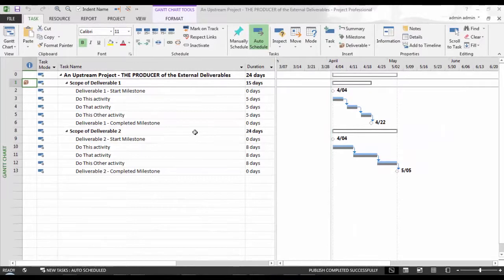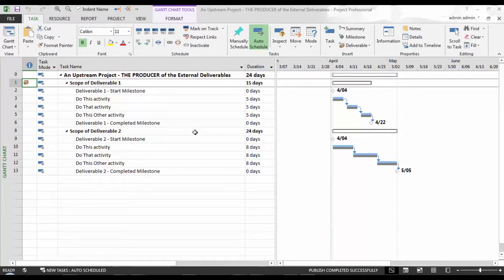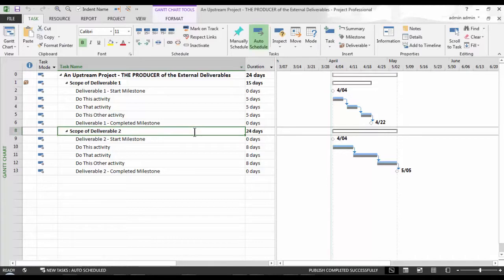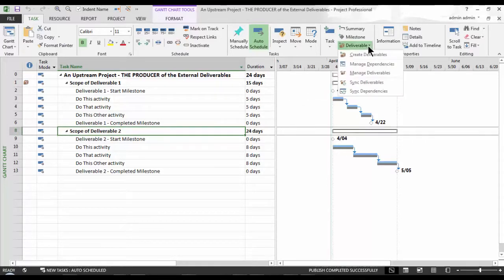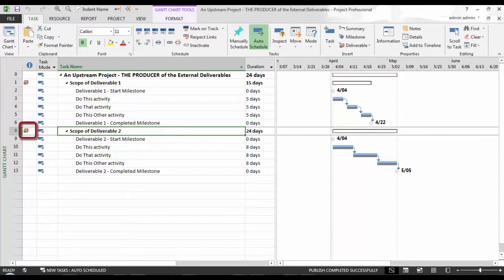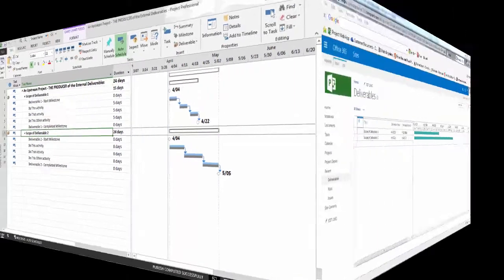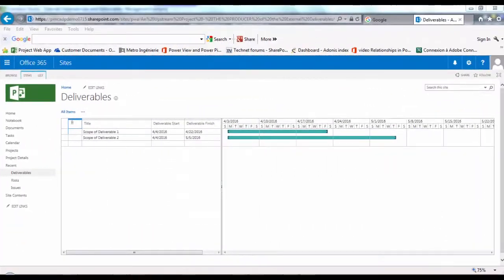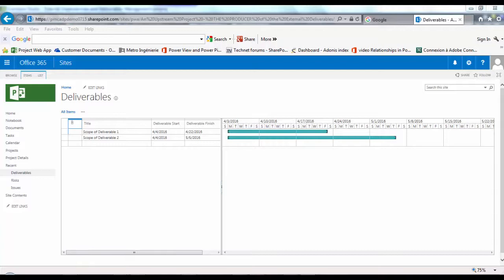Let's do this again, but for Deliverable 2 now. Back in Microsoft Project Pro, select Deliverable 2. This is the one here on row 8. I will click the Create Deliverables menu item here on the Deliverable dropdown in the Task Ribbons Insert group. Again, notice the bronze colored cube icon that appears in the Indicators column. It's that simple. I will flip over to our Project Site to see our Deliverables page updated with a second deliverable listed. I've also extended the splitter bar to the right a little, revealing the Deliverable Finish column.